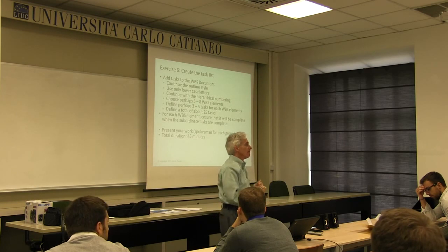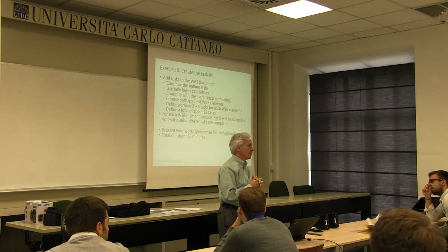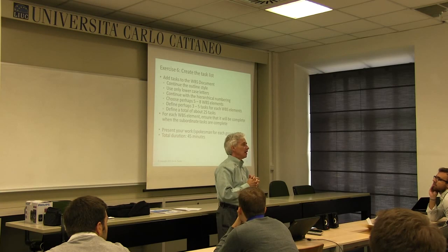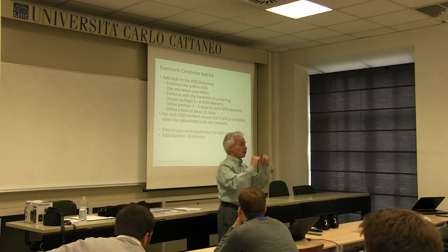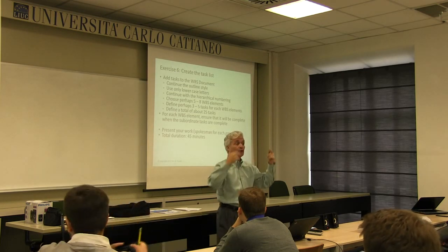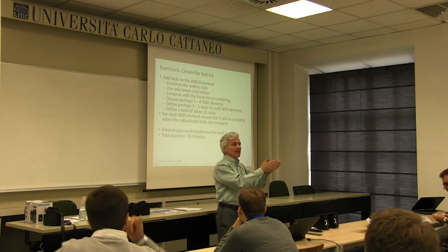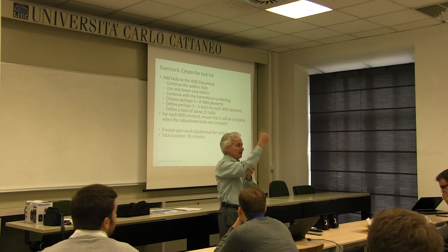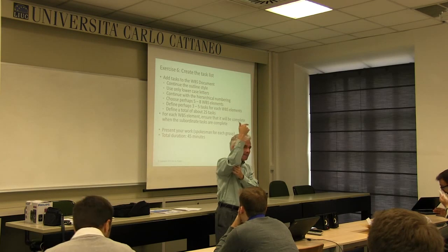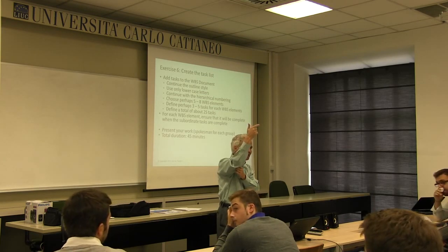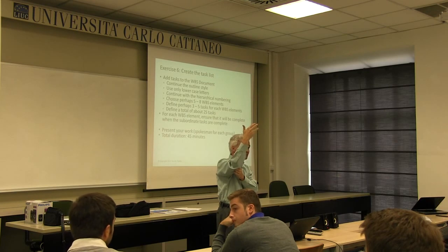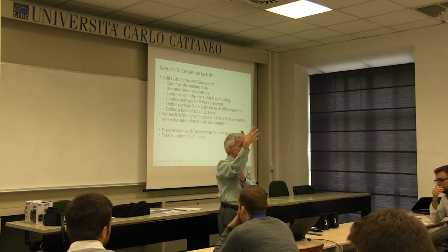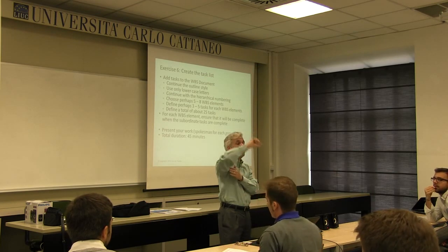And how do we make relations between the tasks? We will do that later on a worksheet, and you will see. So right now, we're not doing the schedule, we're doing the task list. So in the planning process, we have mission requirements, business requirements, system requirements, WBS, task list is next. Then we do the schedule.